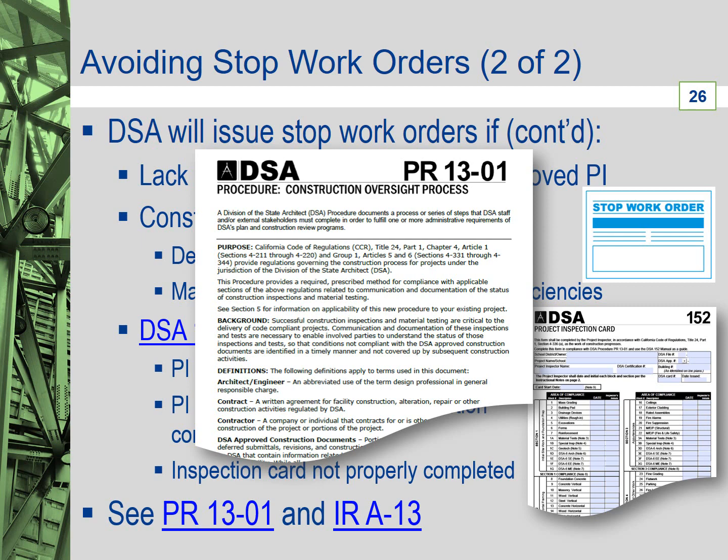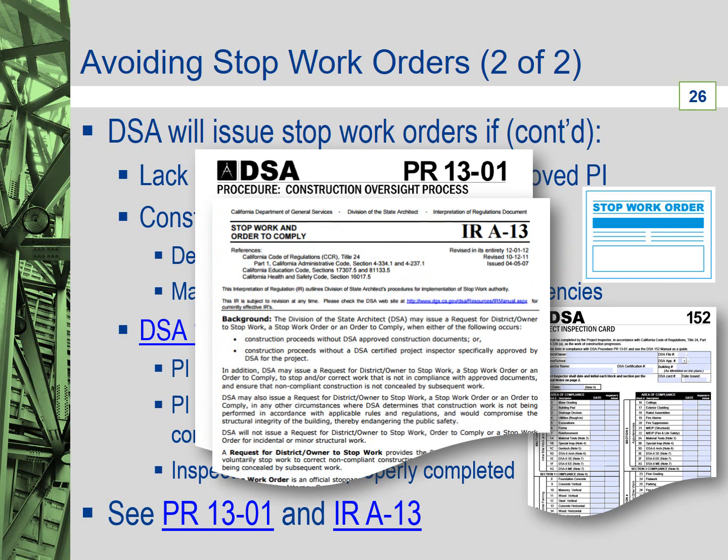Additional information is provided in DSA PR 13-01 and IR A13. The design professional is responsible to effectively monitor the project status in order to ensure that stop work issues do not arise. Additionally, in the event that a stop work order is issued, the design professional must facilitate reconciling the stop work order and ensure the team responds in a timely manner and works aggressively to expedite a resolution.